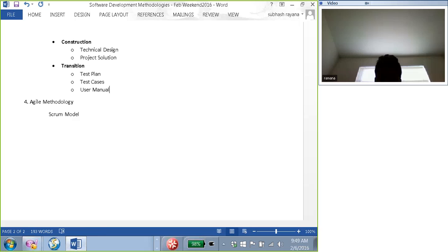See, in the typical waterfall model, when you have finished documenting your requirements and you move on to the design or development, if the business is asking for a change, then it's as simple as that: we cannot accommodate the change. The change they're asking for will be accommodated in the next release, or if they're insisting on having the change implemented right away, then you start from scratch again. You go back to planning, review your planning, analysis, and go on.